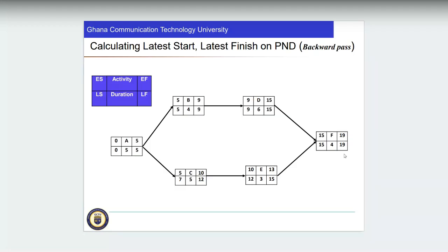Yes. So if I'm getting it right, I don't think it was even a formula. It was something that I studied, and I realized that was how it was being done. Latest start always becomes the latest finish for the previous activity.